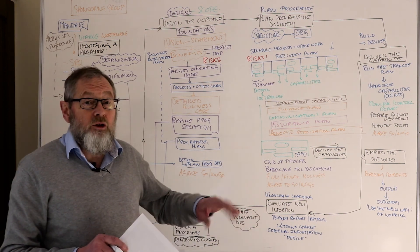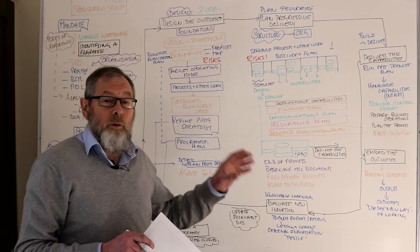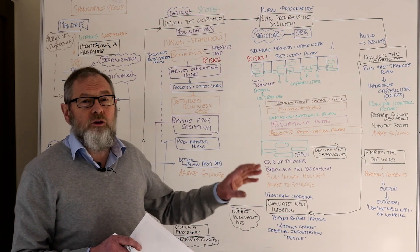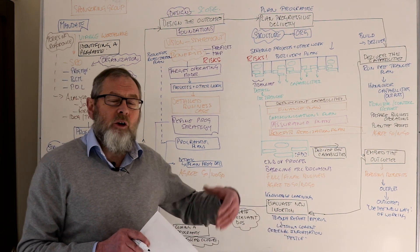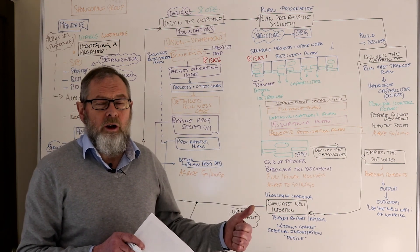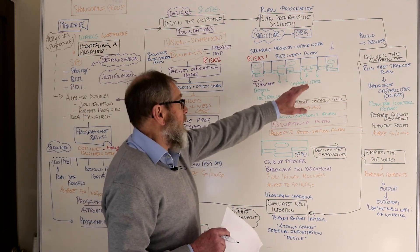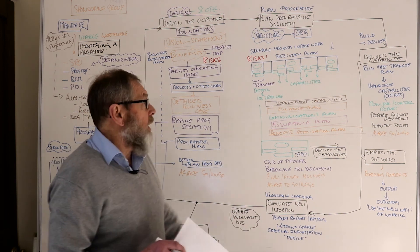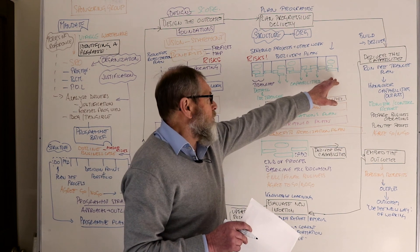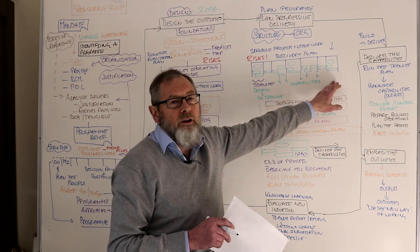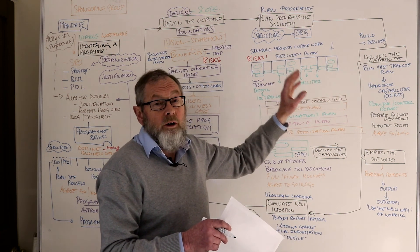There are a few circumstances for closing. First, we've completed all the work. You could also have completed all the work but there are still a couple of projects left that don't really need programme governance to run them — the programme closes prematurely but those projects finish independently. A third scenario: you prioritise work using something like MoSCoW, and end up with a couple of could-have or should-have type projects that still add value but aren't critical to the core change — those can run as independent projects.